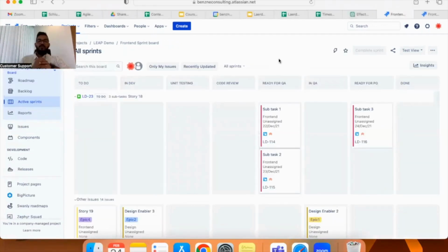The next few tips is around tracking the work which we have planned in the sprint planning meeting. There are multiple ways to do daily stand-up meeting. One way is to go person by person to understand what was the plan for today, what did we achieve yesterday, and is there any blockers or dependency for completing the task we had planned.